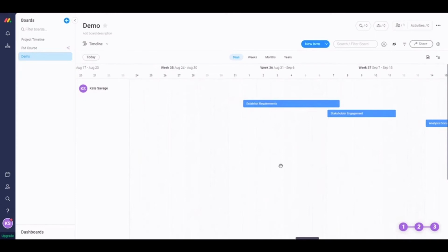If we look at it in total, we actually have to scroll around. There will be screenshots of this in your summary notes as well, so don't worry if you're not getting a clear picture. Now, how did I do all of this? Let's go and have a look. So we've got timeline view, which is where you'll see your Gantt chart. And then here, these slightly grayed out areas are your weekends. What you'll do there is if it only gets finished on the Monday, you just drag it over the weekend and account for that within your notes.